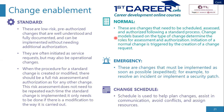Change models, based on the type of change, determine the roles for assessment and authorization. A change model is like a template that could include a procedure for a certain type of change, responsibilities, escalation mechanisms, and the structure of the change form. Depending on the type of change, it may trigger different procedures for authorization, implementation, testing, and backing out the change. So a change model is a structure to handle different types of changes, and having it pre-defined makes it easier to process normal changes faster.